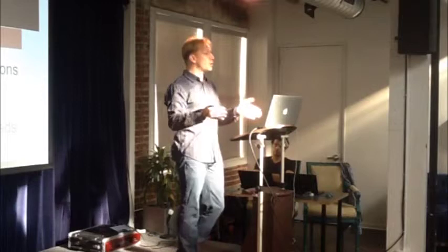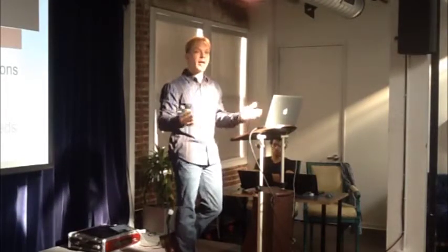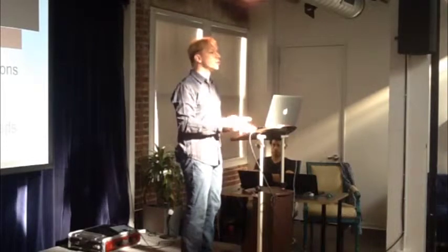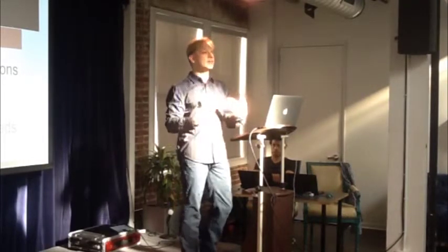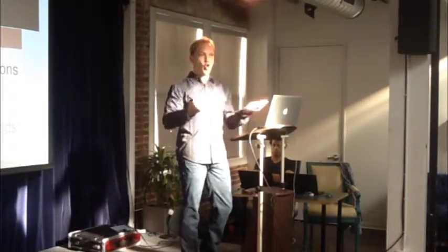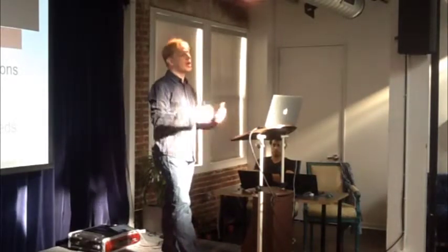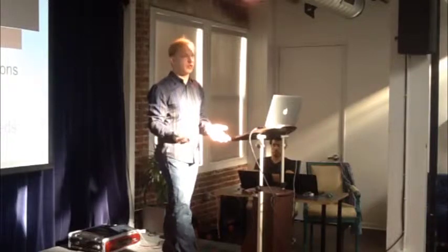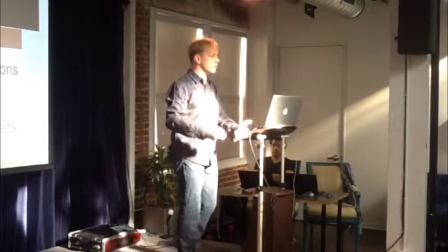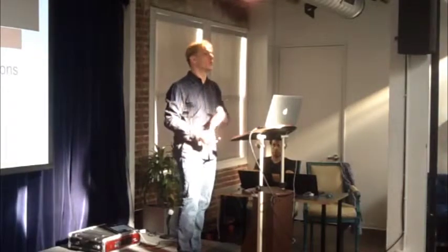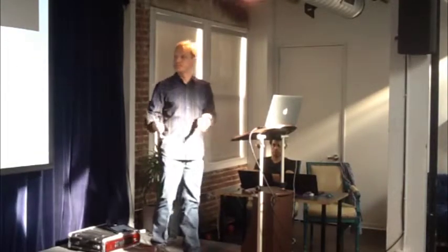So despite all that preparation, the problem is they hadn't put their user flows and their user interfaces in front of the people who were going to use them. Because if they had done that early, they would have caught this particular problem, and it could have been taken into account in the estimate. As it was, it added about 15% to the cost of their project when we had to rework it for that. Fortunately, we caught it early. If we had caught it 4 months in, it would have been a much more expensive problem.